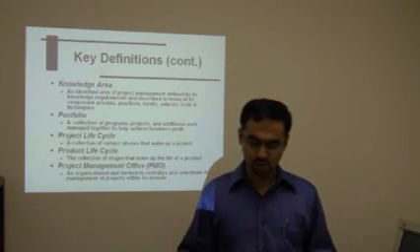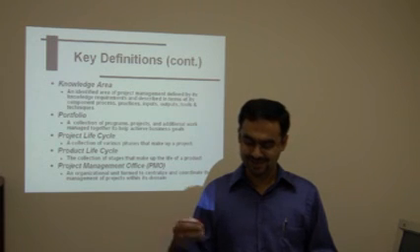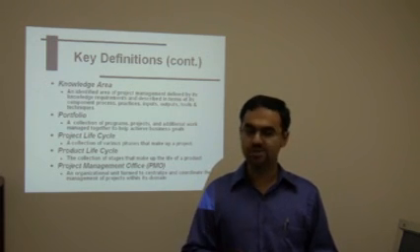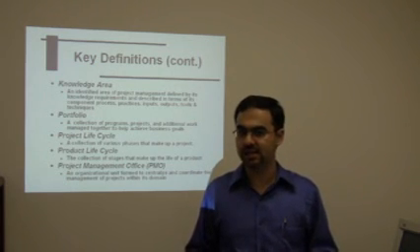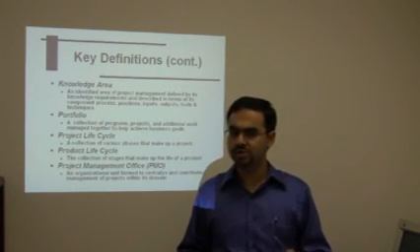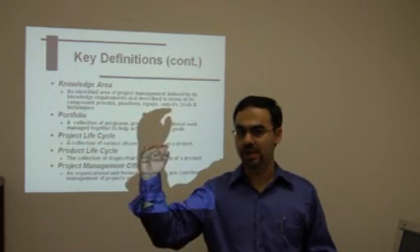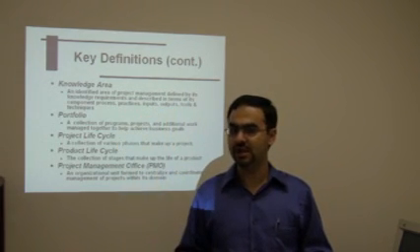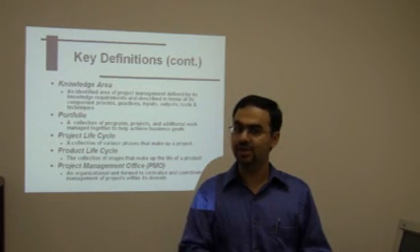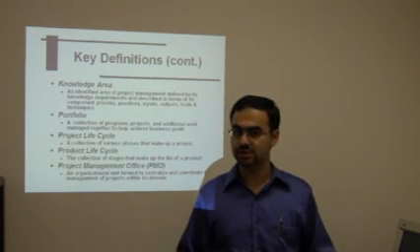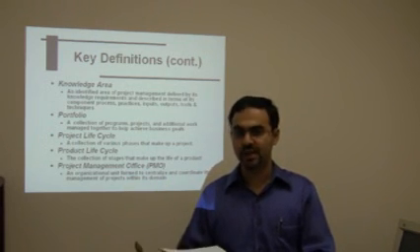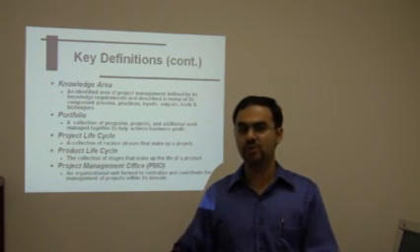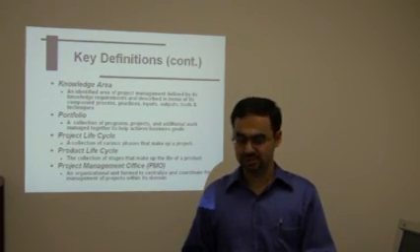Again, a PMO is an organizational unit formed to centralize and coordinate the management of projects within its domain. Again, that last piece is key. Within its domain. PMOs are sometimes established at the main C-level of the organization, meaning at the CEO level, so then they cater to every strategic business unit. In other organizations, a PMO is within a particular SBU, SBU being Strategic Business Unit. So then the domain of that PMO is only that specific Strategic Business Unit.